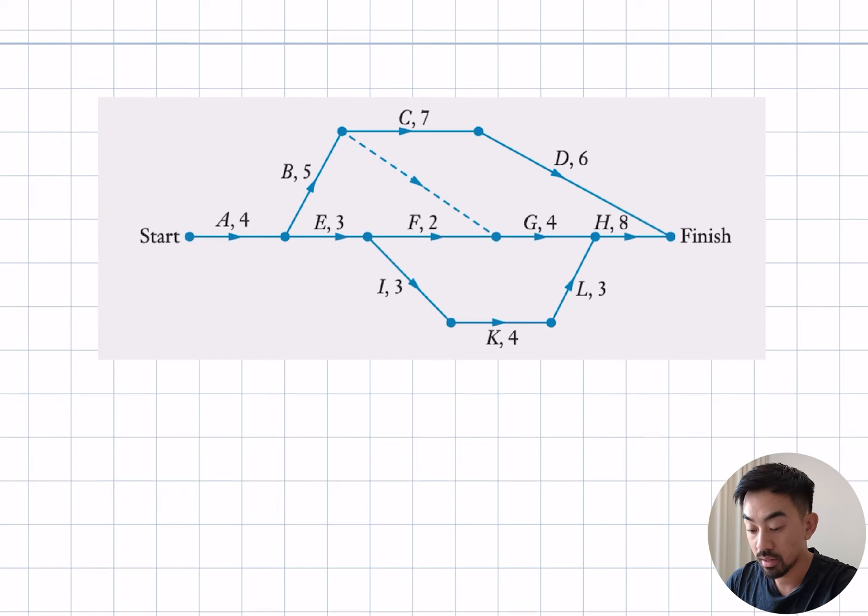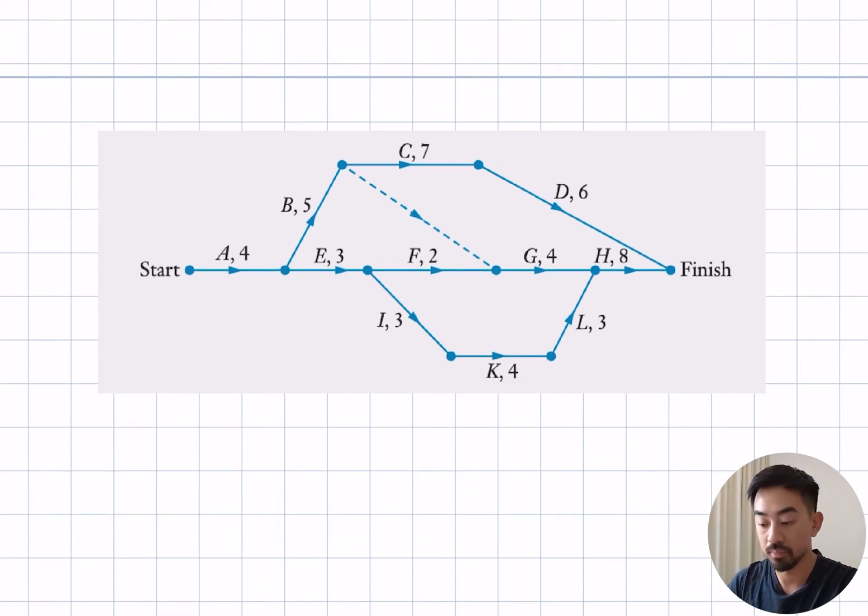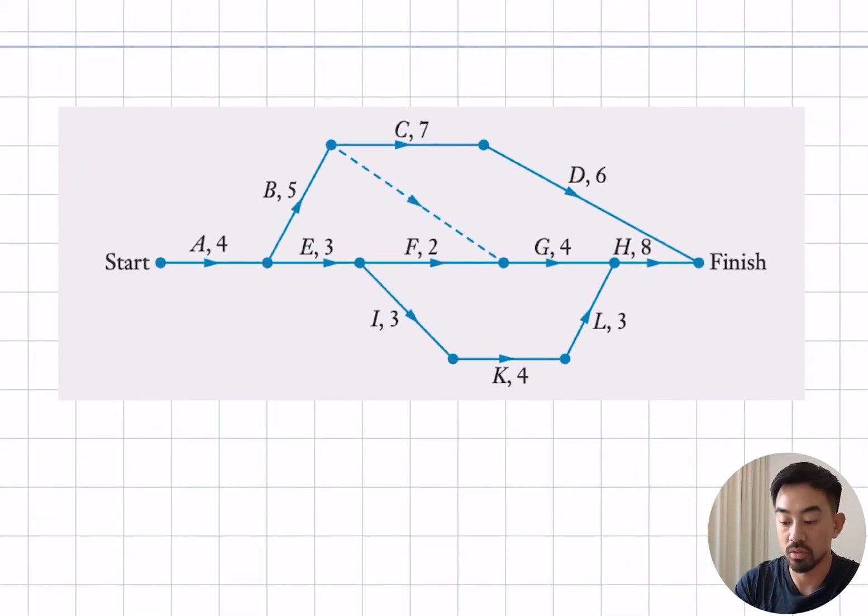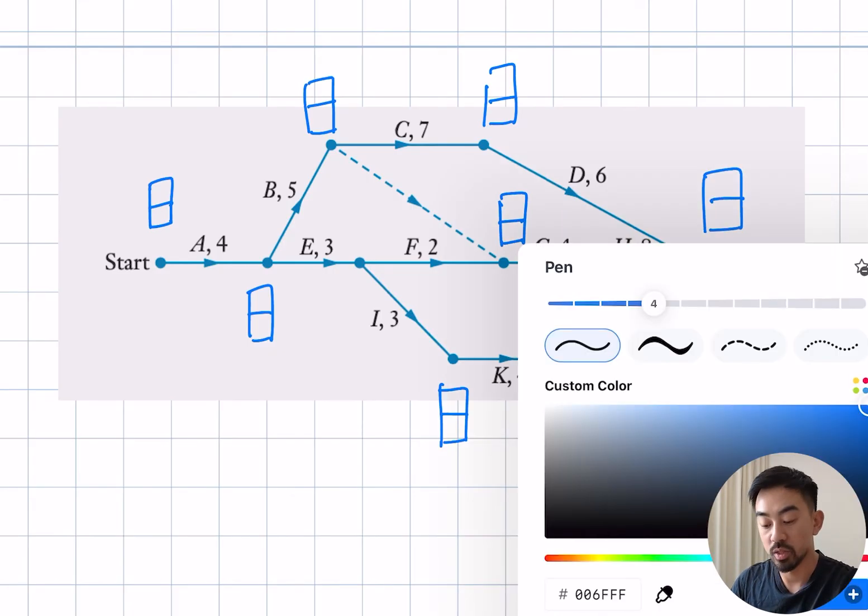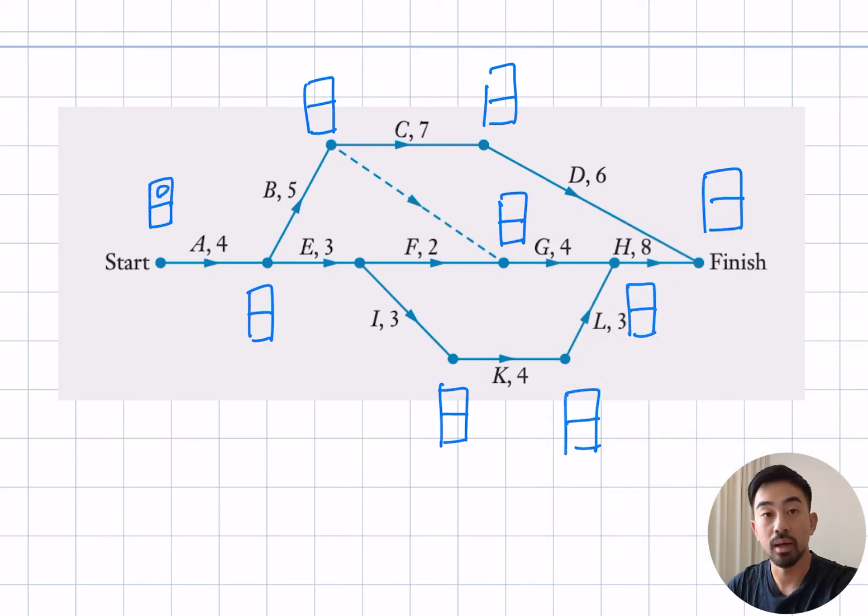Okay, let's look at another one. So here's one with a dummy. Let me draw in my little boxes first. Okay, let's begin. Starting at the start vertex, moving along, 0 plus 4 is going to give 4 here.